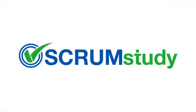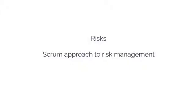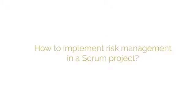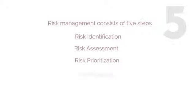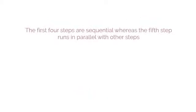Now that we understand what risks are and the Scrum approach to risk management, let's discuss in detail how to implement risk management in a Scrum project. Risk management consists of five steps: risk identification, risk assessment, risk prioritization, risk mitigation, and risk communication. In this procedure, the first four steps are sequential, whereas the fifth step runs in parallel with the other steps.